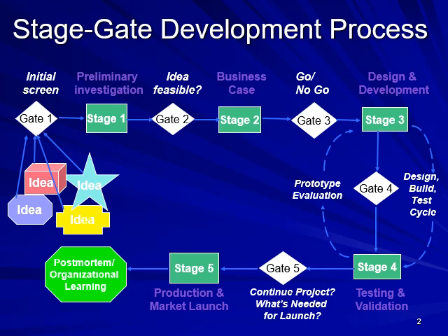The most widely implemented and probably studied process for introducing new products is the stage gate development process. So let me walk you through it. There are some valuable lessons to be learned from it, and it does have some limitations like everything else. The idea of a stage gate process is to break down the development of the product into little projects so that you can have up and down votes as to whether that project is going to be canceled at multiple places, to ensure that the product that comes out at the end is indeed one that has a good chance of being successful in the marketplace.